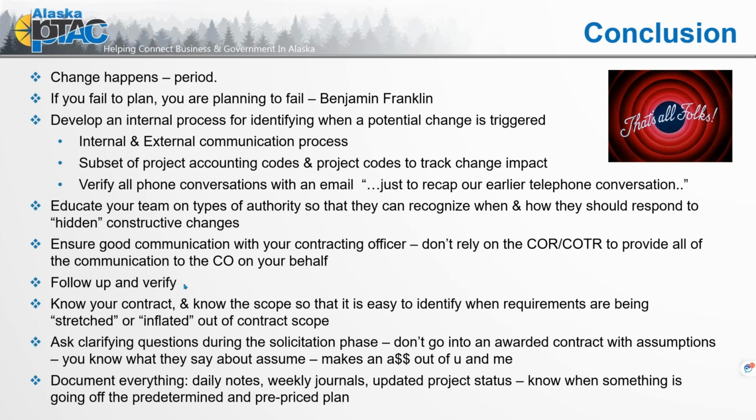And document everything: daily notes, weekly journals, updated project status. Know when something is going off the predetermined and pre-priced plan. And often, especially if you have scope work where you have field staff who are busy, engaged in day-to-day activity, asking them to write up or recap. No one likes paperwork, but it's really critical for trying to identify what happened when and to provide that supporting documentation. We need to be able to support that when we are asking for that additional consideration.